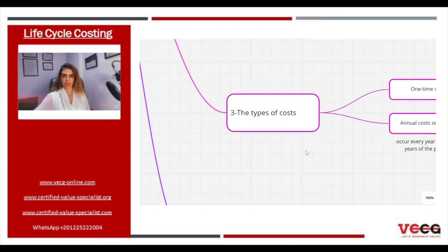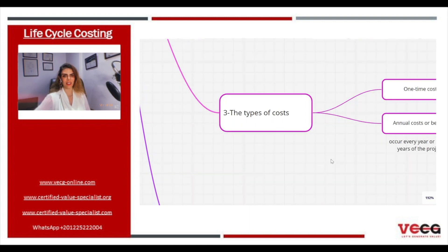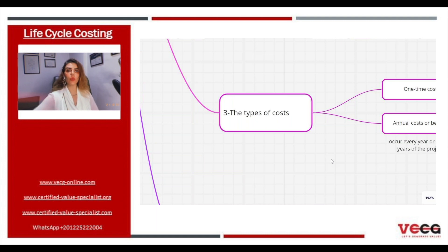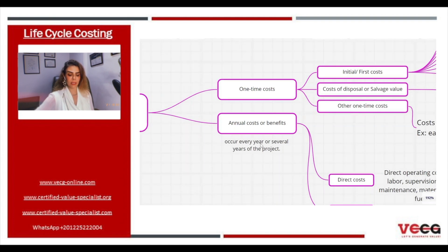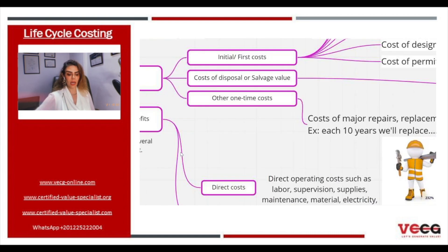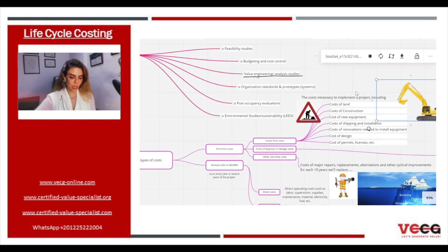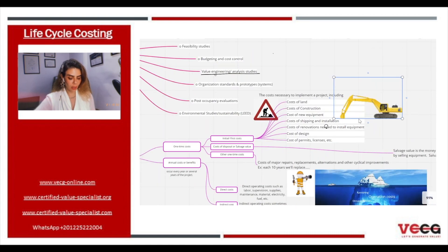What else do we need to know about life cycle costing? We need to know the types of costs. We have only two types of costs. The first type is the one-time cost and the second type is the annual cost or benefit. Regarding the one-time cost, it breaks down into three different types. The first is the initial cost, also called the first cost, which refers to the cost necessary to implement a project.